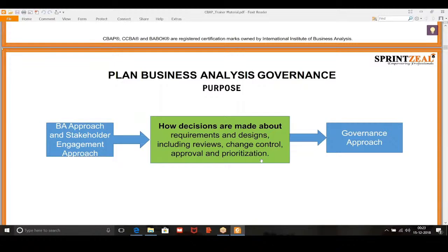So basically, we can highlight these in our BA governance plan, wherein if there is a conflict of requirements, maybe we can deprioritize some of the items from the release, and we can adjust the backlog with new items, with another MVP item. So that's the approach we can take.